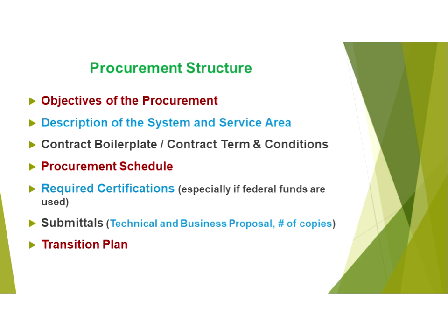There should be a minimum of 2 weeks between advertising your RFP, and yes, they do have to be advertised, and the pre-proposal conference. In that RFP, you list the pre-proposal conference date, the question deadline date, which could be a week later, not sooner than that. Assume you'll always have an amendment, an addendum.